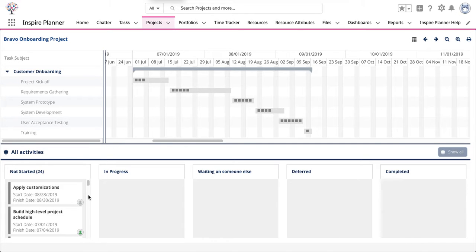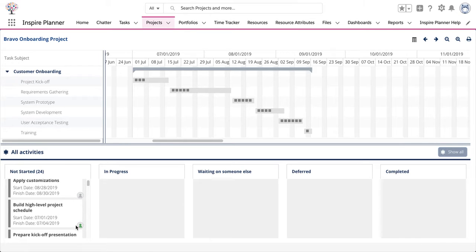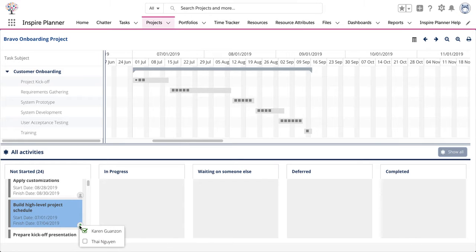At the bottom right corner of each task is an assignment indicator. If the task is assigned to a resource, the assignment indicator appears in green. If it is grayed out, then it means that the task has not been assigned to a resource. To view the resource assigned to the task, simply click on the assignment indicator. The assigned resource is selected within the list.